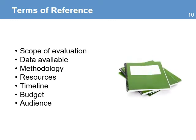The terms of reference is a critical document for a successful evaluation. The quality and completeness of this document will help management find and select the best evaluator or evaluator team for the job. A terms of reference will contain the following: the scope of the evaluation; the data that is available and how it will be made available to the evaluator; a description of the type of methodology required and the resources needed; a timeline describing the sequence of work and the expected due dates; a description of how the budget proposal should be presented; and the identification of the main audience of the evaluation report.